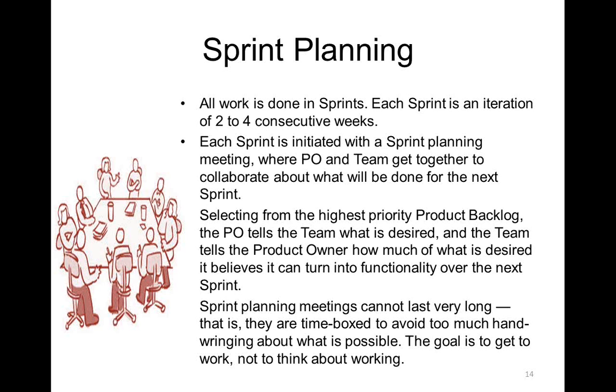And the team tries to decide how many of these stories can be delivered in a given iteration or in a given time box. And mind you, these stories have to be picked up in the same order. It is not possible that teams start picking something from the top, something from the middle, and something from the bottom. No, that is not allowed. The team has to start picking from the top sequentially and see how many stories they can deliver